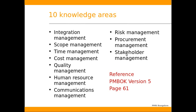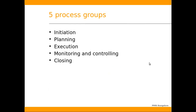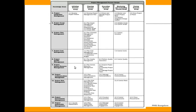So there are 47 processes grouped into 10 knowledge areas, and these 47 processes are again grouped into 5 process groups: Initiation, Planning, Execution, Monitoring and Controlling, and Closing.